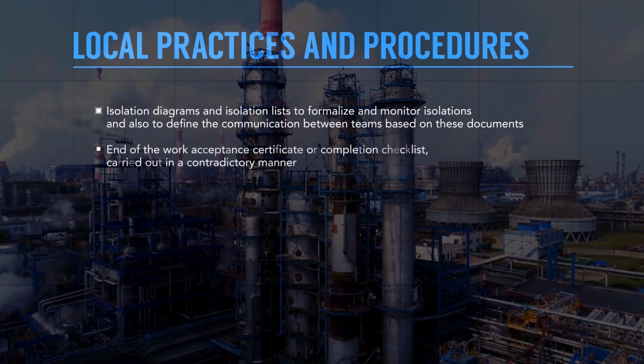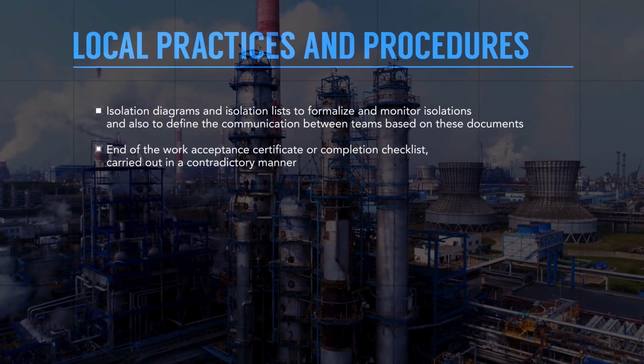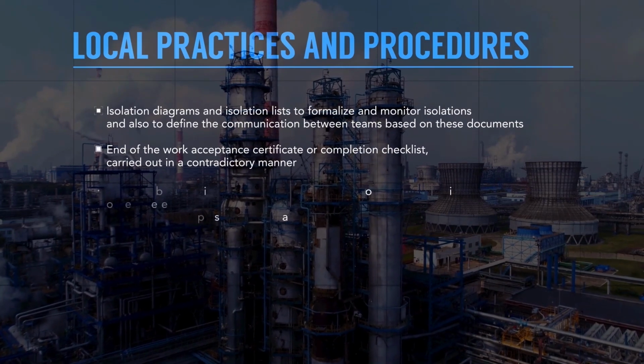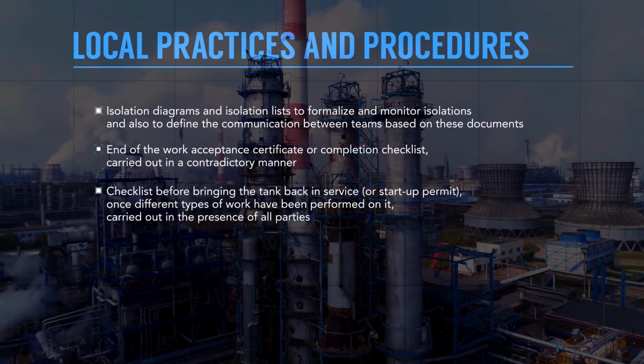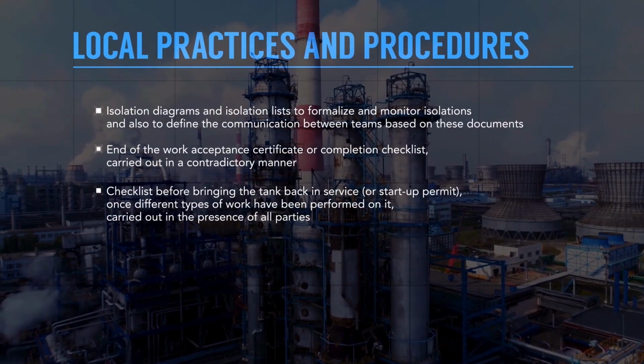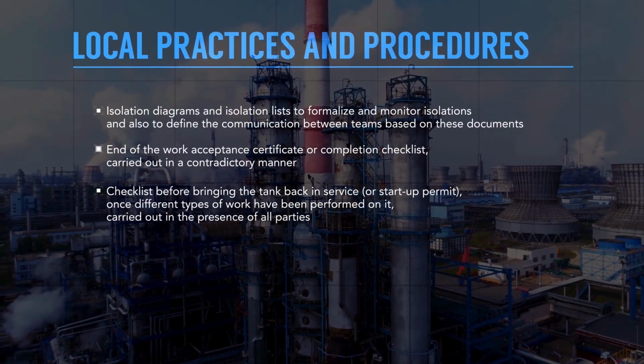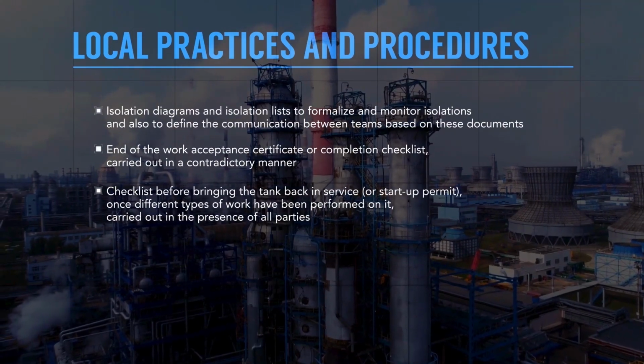End of work acceptance certificate or completion checklist to be carried out in a contradictory manner. Checklist before bringing the tank back into service, or startup permit once different types of work have been performed on it, to be carried out in the presence of all parties.